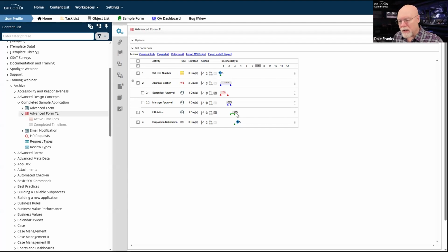Now, in this particular case, the task takes a day. We're probably not going to configure it to take less than a day. So there's, in this specific instance, not much we can do. But let's say that this was a task that we had allocated to take a month. And it's getting done on average 31% faster. Well, if we assume a month is 30 days and we just slice 31% off of that, what that really means is that on average, this task is being completed in 20 days.